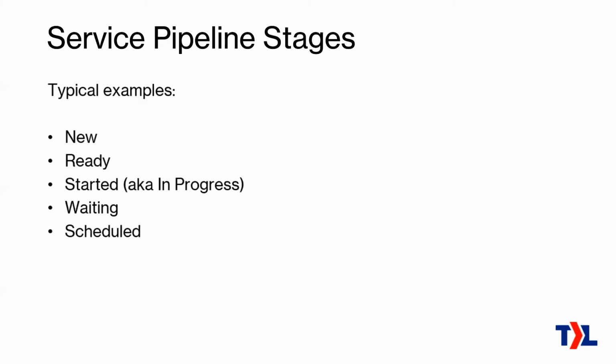Scheduled is those things that I mentioned where the next step of that ticket is that it has to happen at a certain time of day. So that would be, for example, going on site, or maybe it's a scheduled network outage that was coordinated with the customer or something like that. So there's nothing to do with that right now. We are going to wait until the calendar says, yeah, it's time to do that.